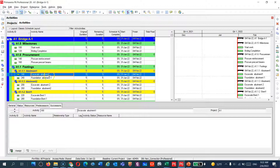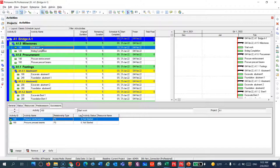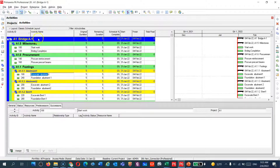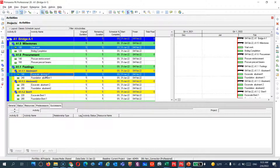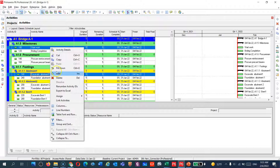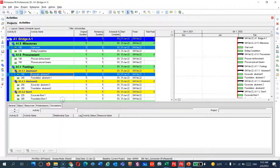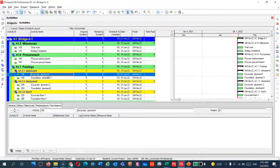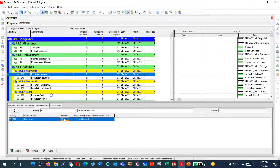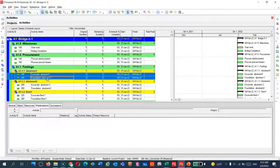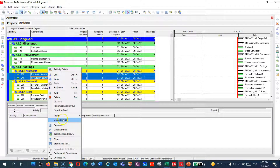For excavation of abutment one, I also need 'Start Work' as predecessor. I can highlight these two activities — hold Control to select both — then right-click and choose 'Link Activities.' If you go to that activity now you'll find it tied to 'Start Work.' You can also change the relationship type if you like. Then highlight excavation of abutment one and the footing together, right-click, and tie them.